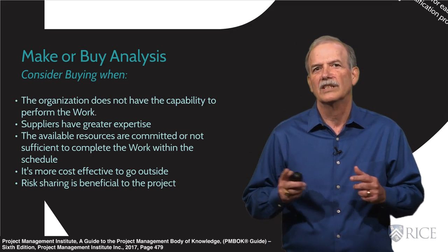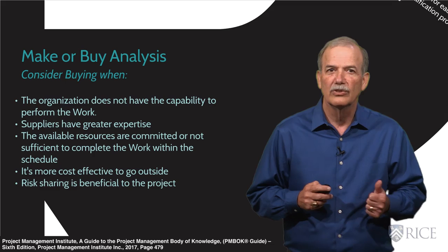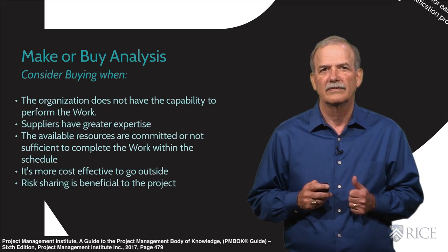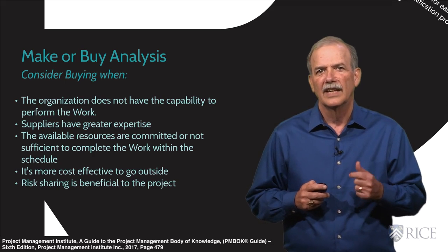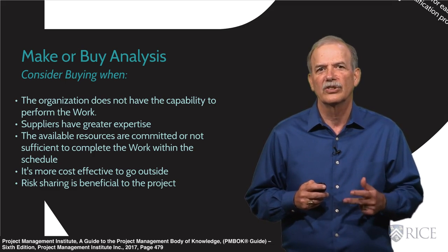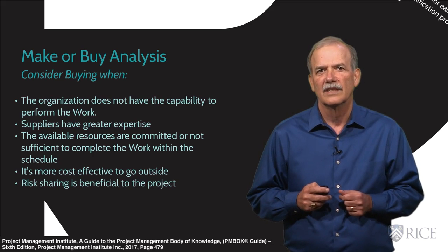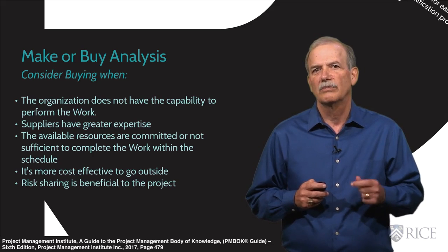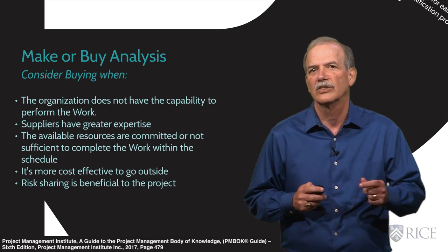The three big reasons to go outside the project organization are someone else can do it better, we don't have the resources to complete the task in a timely manner, and the risk to the project or organization is diminished overall by sharing this work. If the activity in question meets one of these criteria, there's a good chance that going outside the organization is the right choice.